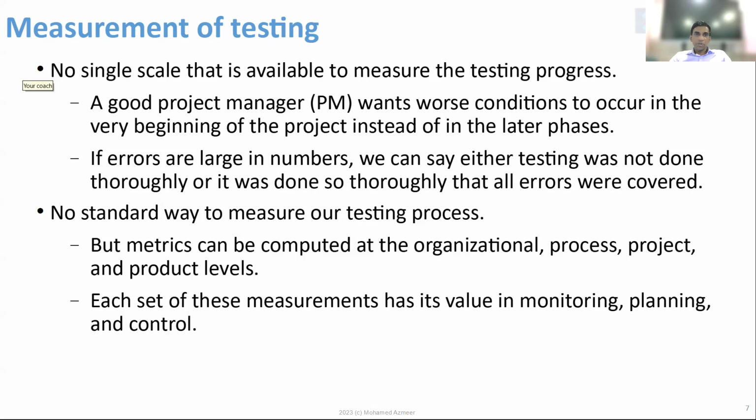So as it says, a good project manager wants worse conditions to occur in the very beginning of the project instead of the latter phases. Why is that? Remember, we looked at the chart. We said if you can find the problem in the early stage, fixing that is actually cheaper. Cheaper as in time-wise and also money-wise.